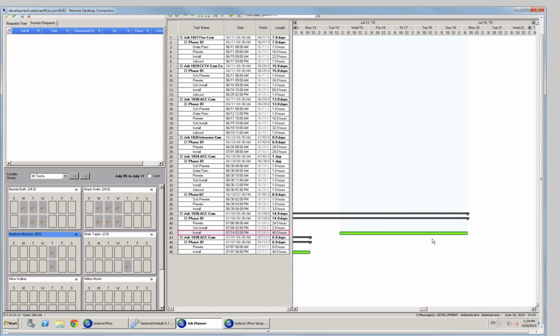So if you drag it on a Sunday, and they don't work on a Sunday, obviously it will expand to another day. Yep. Yeah, so it'll lengthen this chart. It knows that it has to extend beyond Sunday, and it may appear as a 5-day job, but if you're not working Sunday, it'll just lengthen the task to show the completion date going out farther.